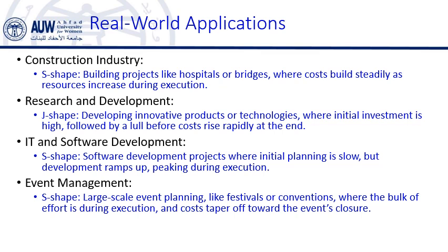So, for example, building a hospital is a great example of an S-shaped project. In the initiation phase, the project starts with feasibility studies and obtaining permits, which require relatively little cost and effort. During the planning phase, architectural designs are finalized, contractors are hired, and schedules are set.